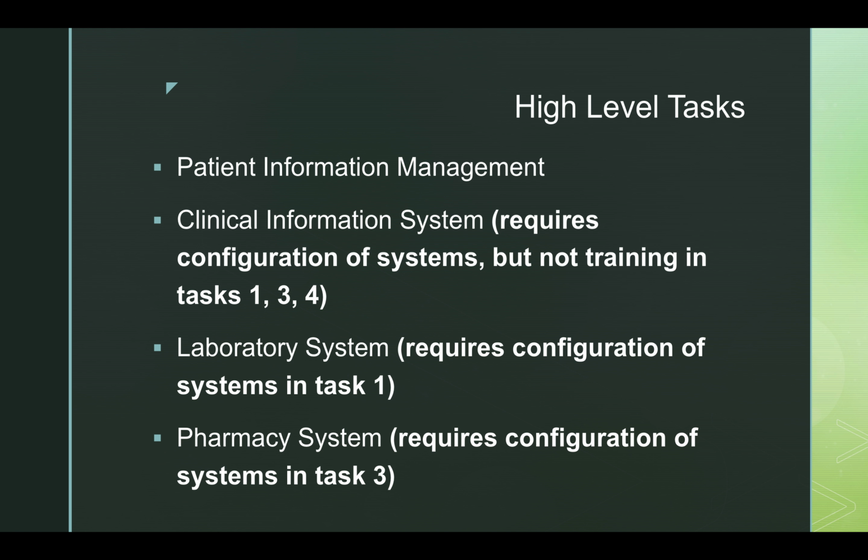So back to our project, we have 4 high-level tasks. We have patient information management, clinical information system, laboratory system, and pharmacy system. For some of these tasks, we have a requirement for a configuration of systems, meaning that these cannot be started until the required configuration is done prior to it.